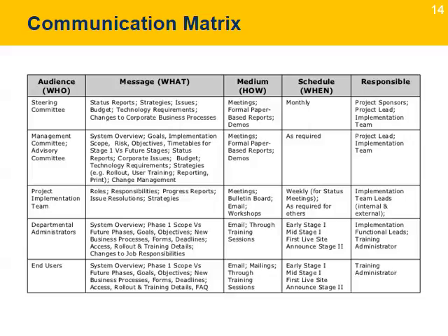The communication matrix organizes all the information of the plan in a simple format that facilitates its implementation. Each column corresponds to each one of the elements of the project plan. Depending on the needs of the project, the columns can be modified to add more information. For example, approvals for sending the communications and priorities to optimize use of the resources. The matrix is a simple method to visualize the communication plan and make it available for all team members that have a responsibility to communicate.